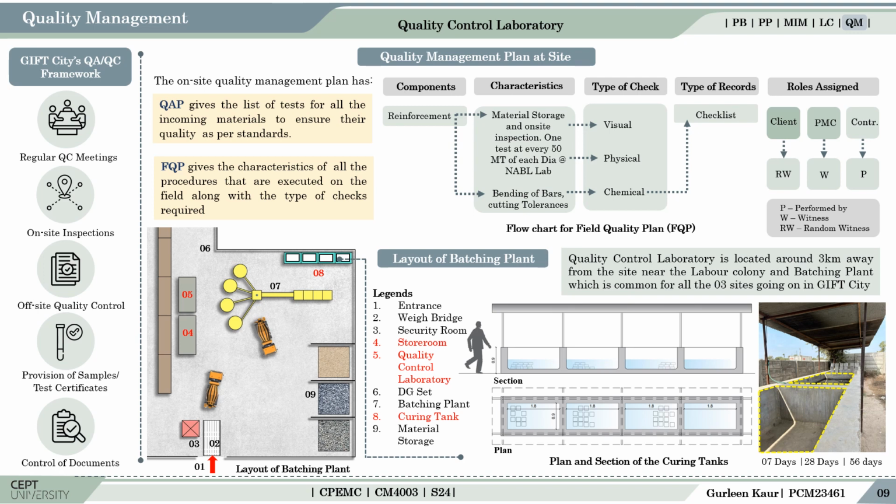Moving further with the quality management, it is a crucial part of any project that involves implementation of all the processes to ensure the execution is being carried out as per the specified standards of quality. As the site is in the GIFT City area, it was important to study the GIFT City's QA/QC framework that ensures quality provision by conducting regular QC meetings, on-site inspections, and off-site quality control by collecting all the material test reports, samples, certificates, and by maintaining all the documents.